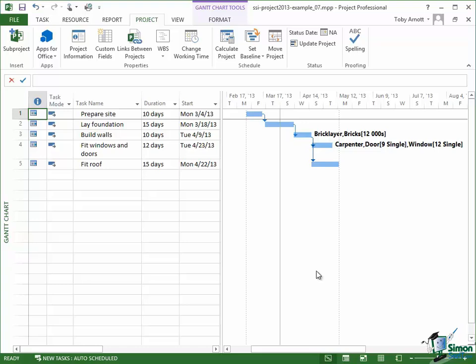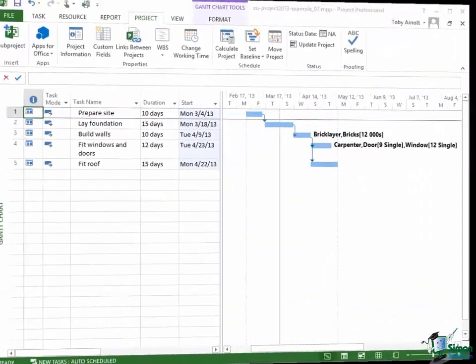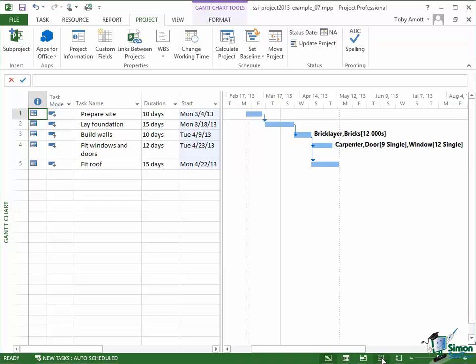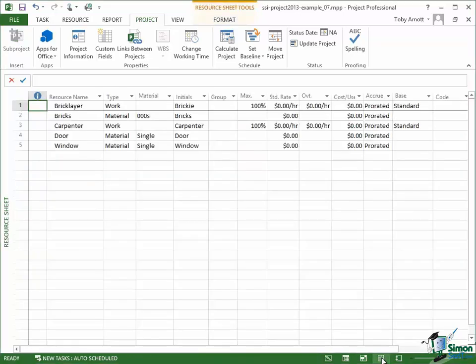Now basically the majority of people working on this project will be working to the same hours as the project itself. So let's go in and look at those individual resources and make sure that we've got their calendars set up correctly. So I'm going to use the button on the status bar at the bottom to switch to the resource sheet. And then on the resource sheet I'm just going to double click on Bricklayer.